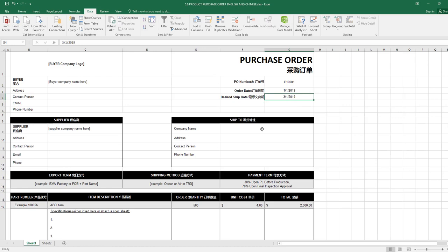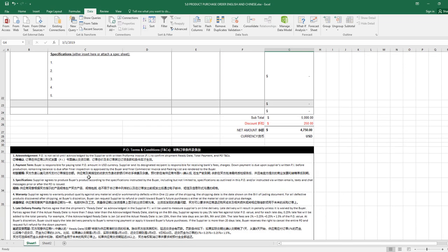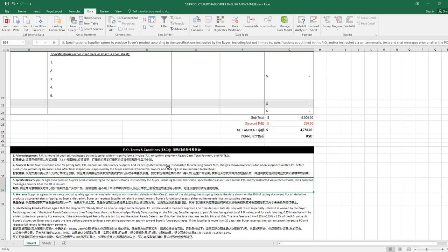added in between. But this desired shipping date is not a contract date. It's only your desired date. The contract date, guys, is the date acknowledged in the supplier's proforma invoice, this PI. In the contract world, the party who has the last paperwork prevails.